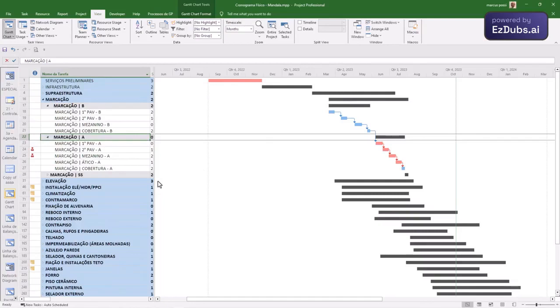They are painted yellow precisely to draw attention to the proposed application of the balance line concepts, here in a typical CPM planning. One activity precedes the other precedes a third, and the network establishes a logical production network. It is a production network that is better optimized as early as possible, but still with the condition of doing it, stopping it, doing it again, stopping. Why are there these gaps?